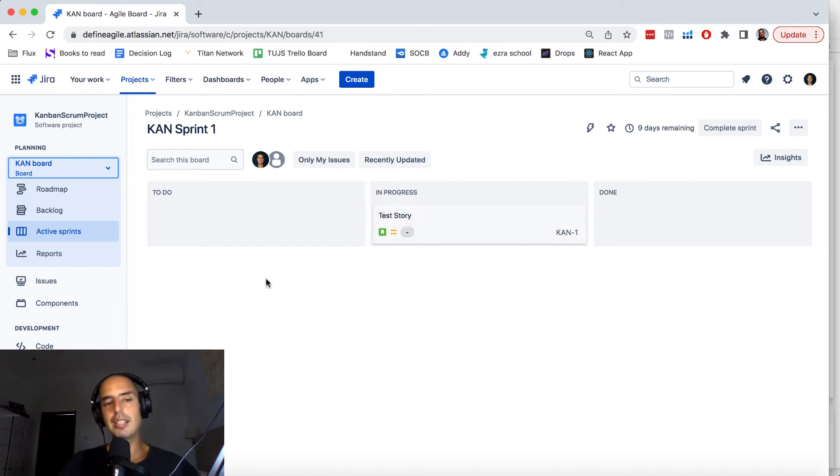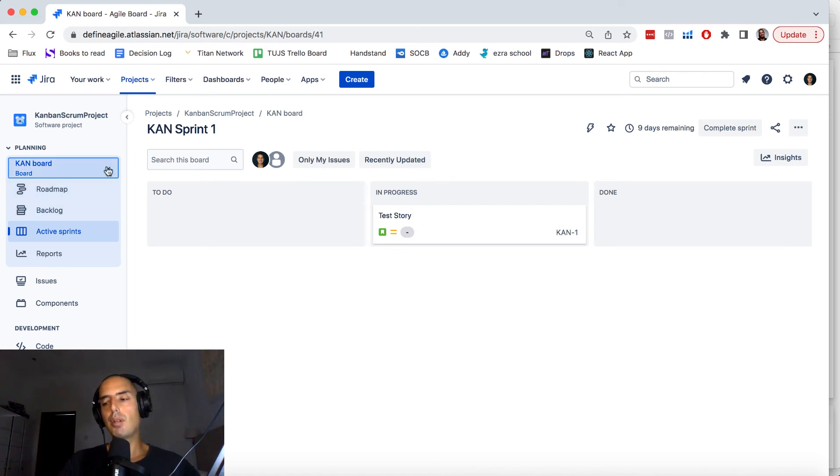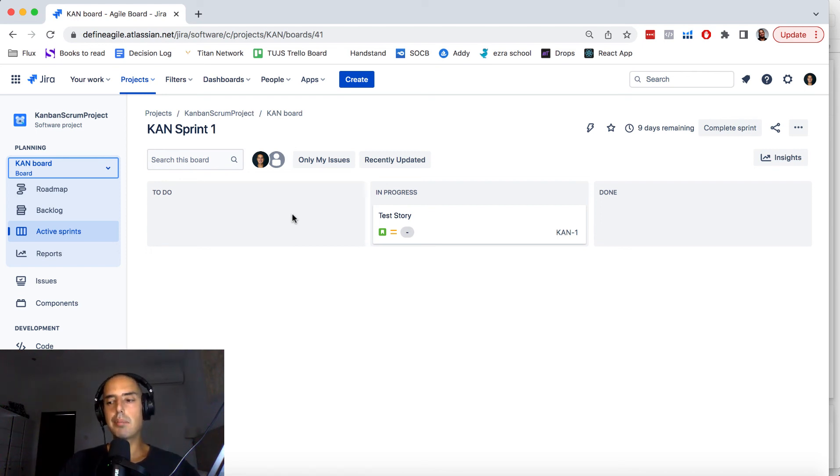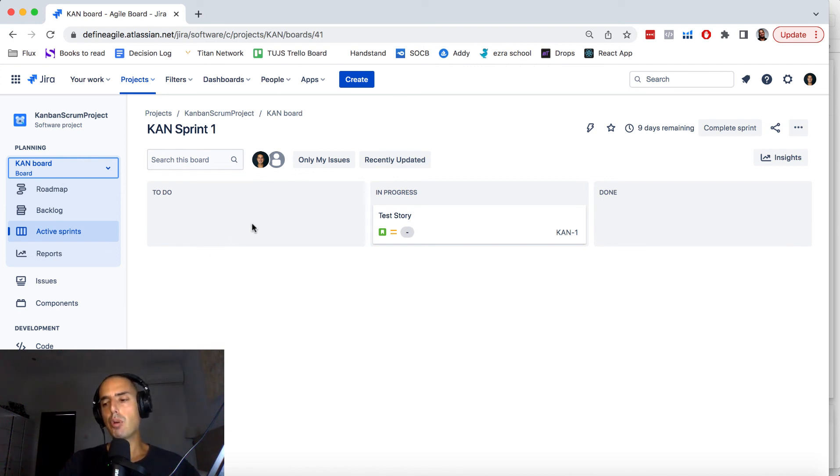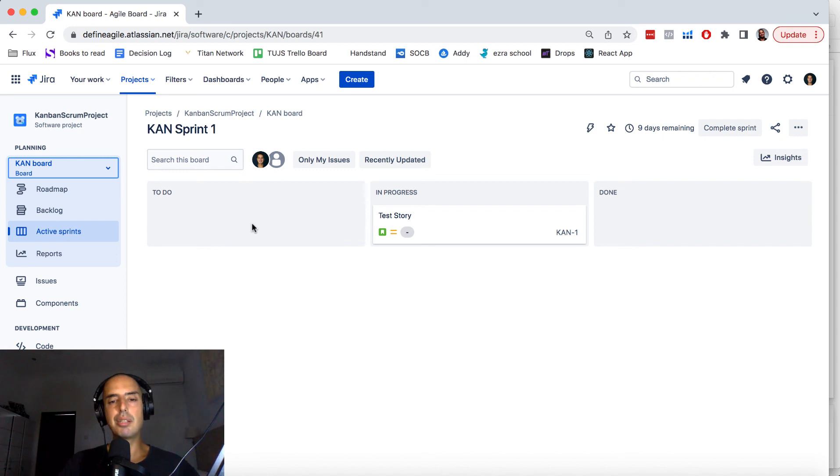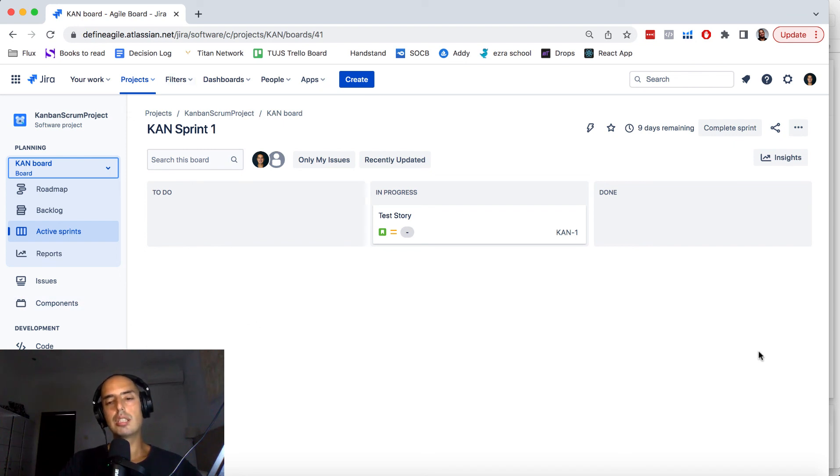I might as well create a bunch of boards because boards are just a filter and then statuses you can do whatever you want, you can map them anywhere you want and this can automatically appear if you match status. I showed you in progress just as an idea. This can be ready for development and your PO last column can be ready for development. When they move ready for development it appears and if it's two Kanban boards, let's say which I think would be a better approach in here, then developers would see it just appear and they can start working and they can start picking up. I've seen it done many many times. Or you have your PO and you have your designers and when PO is ready collecting requirements then it goes to ready for design, design picks it up. When designs are done we create a new ticket or we just put this ticket into development and then your Scrum board is just like a development board so it moves forward. Hope it makes sense. I know it's a lot of terminology a little bit more advanced.